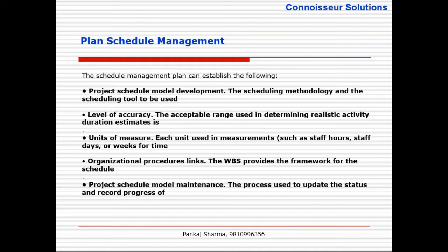Whereas once the requirements are detailed out, when you have reasonable clarity about the project, at that point of time the estimates will vary from minus 5% to 10%. That's why they are called definitive estimates. So when it comes to definitive estimates, you have more information to give a more realistic time. When you come to definitive estimates, you have created your work breakdown structure, you have decomposed it into granular activities, and you have a very good level of prediction regarding the completion date and cost of the project.